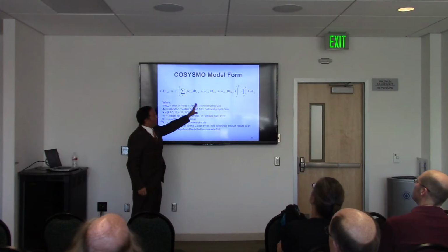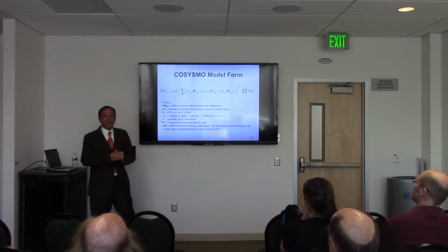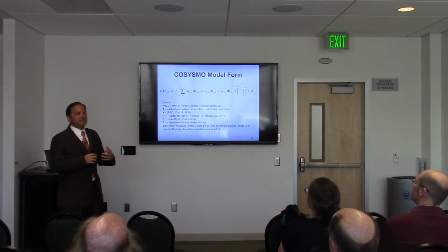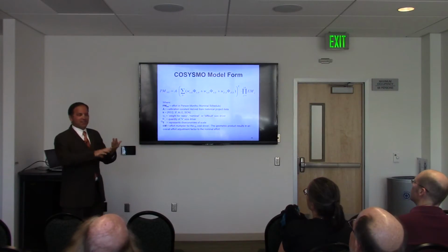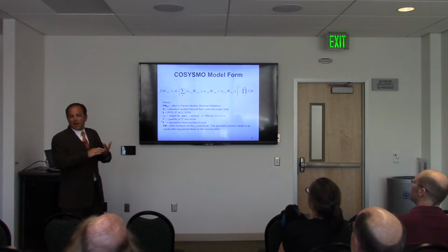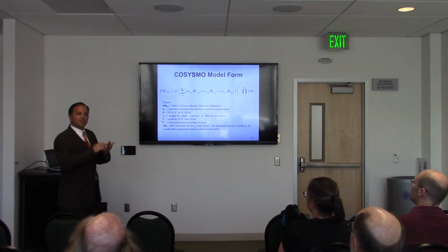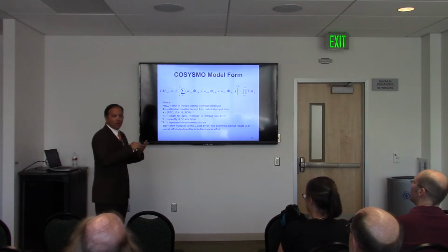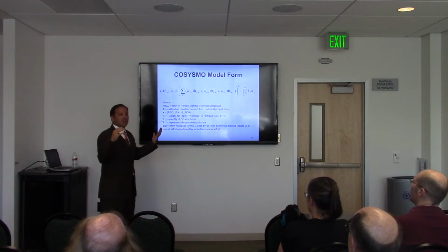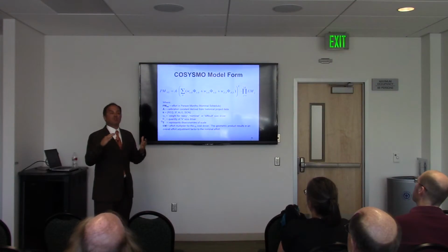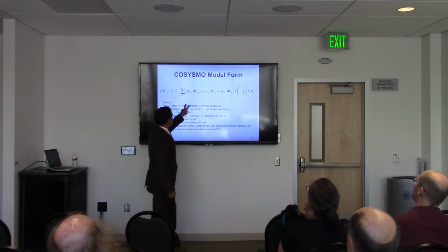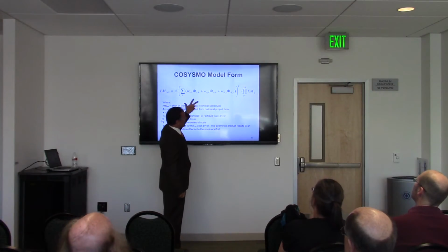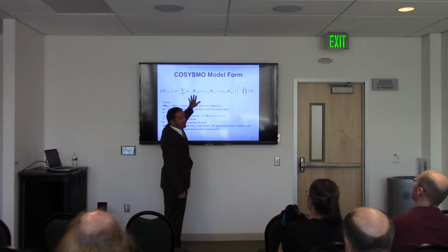This big parentheses is a weighted sum, and what we're trying to manage is various size inputs. So remember earlier I presented requirements, interfaces, operational scenarios, all of these characteristics of systems that either all or just one can be used to quantify how big the job is. So functional size, not physical size. And the reason why we have a weighted sum is because we know that requirements, for instance, some of them are easy.